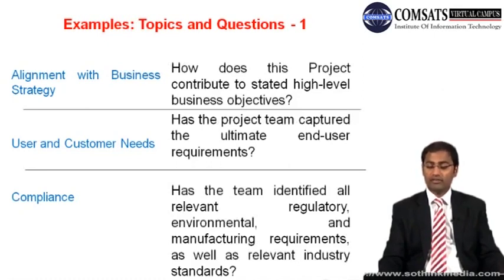identified all relevant regulatory, environmental and manufacturing requirements, as well as relevant industry standards? So if you want to construct a road, who would be the regulatory bodies you may have interacted with? If you are running an NGO, whether you are in need of an NOC from police and other departments in that area, you want to complete all this R&D beforehand.